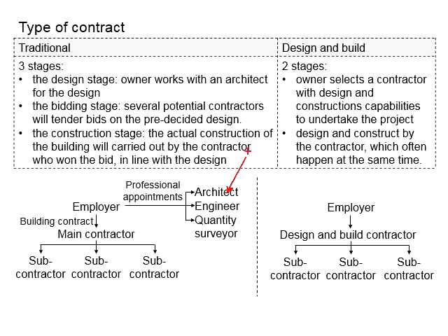The architect produces the architectural design, engineers produce the engineering plans, and the quantity surveyor works out the BQ. All this information will be compiled in the tender document for the potential contractors to bid for the project.